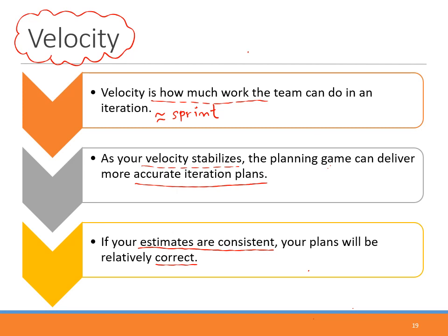Working together may need some adaptation to each other. The collaboration may not be done very well. Work efficiency may not be so good. And that means the velocity of the very first sprint may be low. Once you know how to work effectively, once you know the team, once the collaboration among every member is very good, the velocity of the team increases.